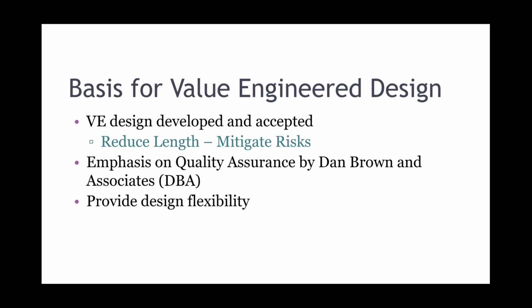We continued, the basic VE was developed and accepted, and we were looking to reduce the length of the rock socket and mitigate construction risks. The additional testing that comes through this that's pertinent to this webinar is the emphasis on quality assurance by an engineer who is intimately familiar with the design requirements and the material. Because to address the variability, it also provided design flexibility in real time. And so that wasn't just at a whim.